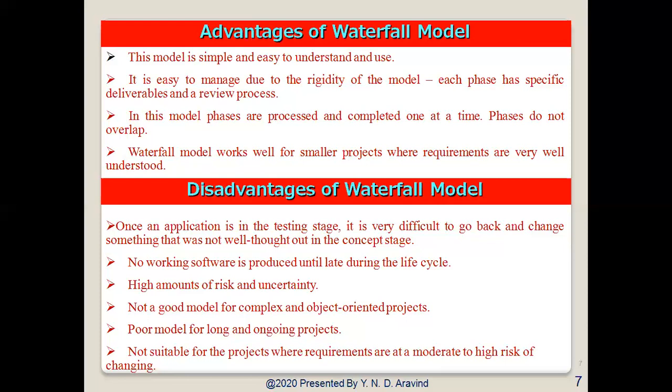At the same time, there are many disadvantages of the waterfall model. Once the application is in the testing stage, it is very difficult to go back and change something that was not well thought out in the concept stage. No working software is produced until late in the life cycle. Here we cannot complete until all the phases are completed, and only then will the complete model be identified.